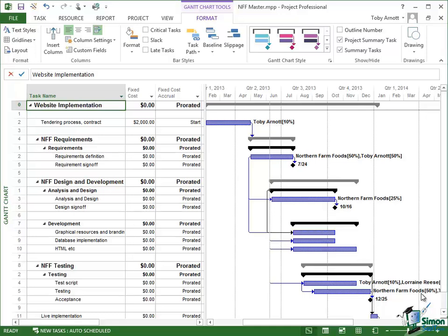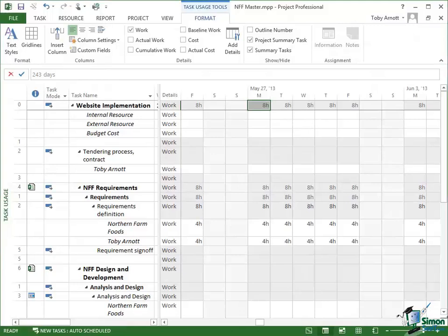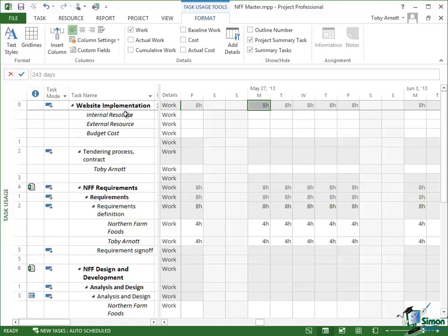And now what I need to do is to actually put the amounts in. In order to put the amounts in, I need a different view and I need to go to either Task Usage or Resource Usage view, and I'm going to go to Task Usage view. Now you can start to see here the reason for needing this view, because when you go into Task Usage view, for each task in the project you have listed underneath it the resources, and in the case of the project summary task, they are the three resources: Internal Resource, External Resource, and Budget Cost.